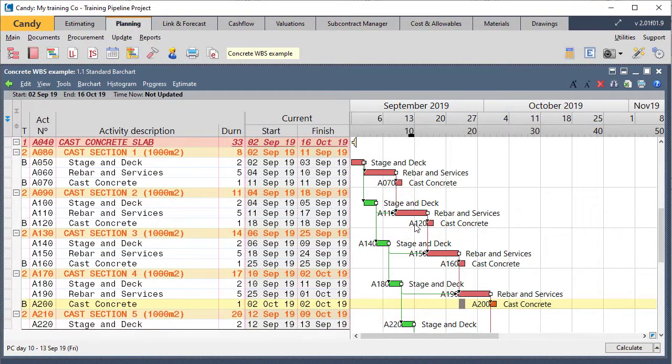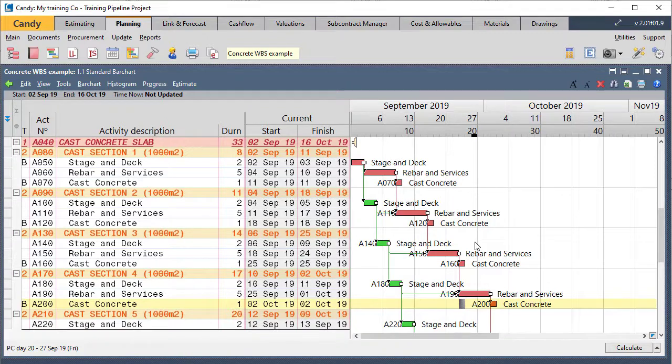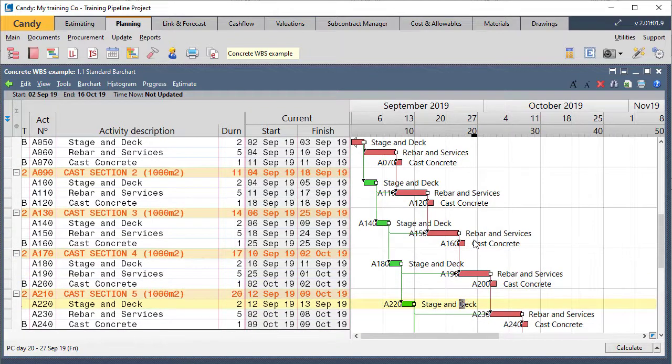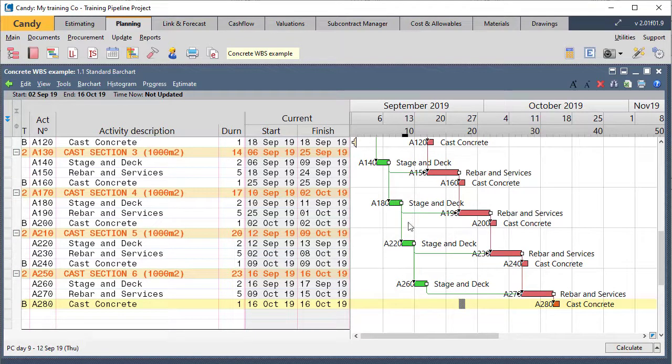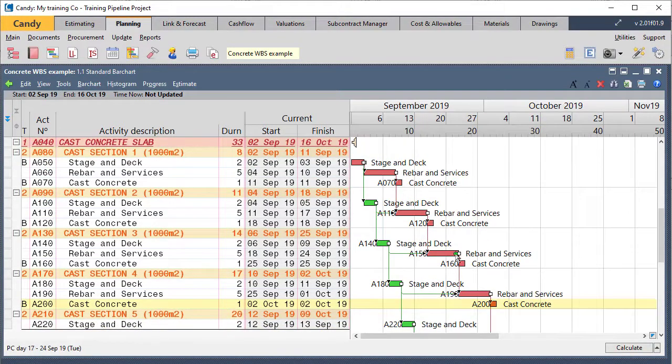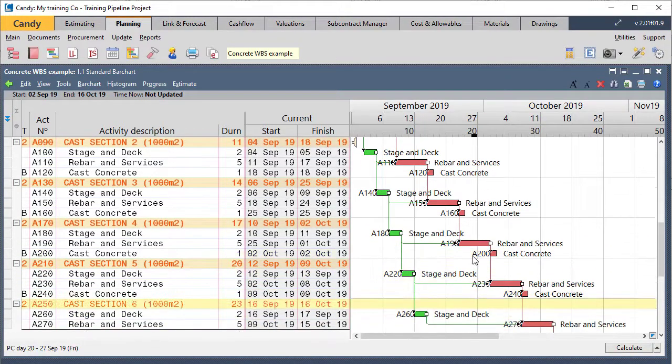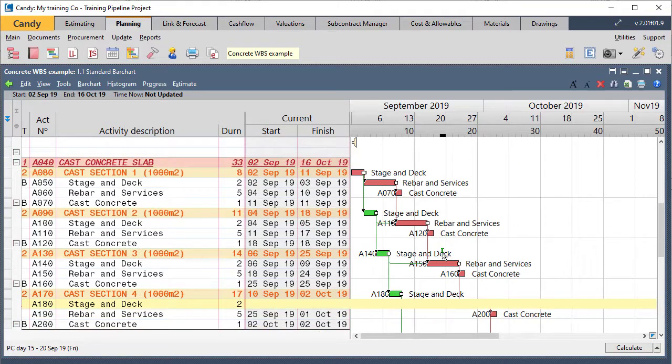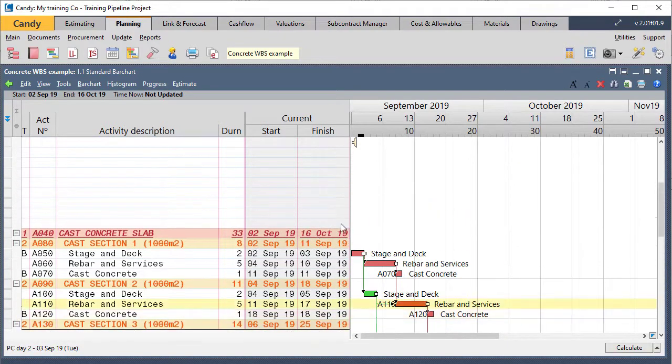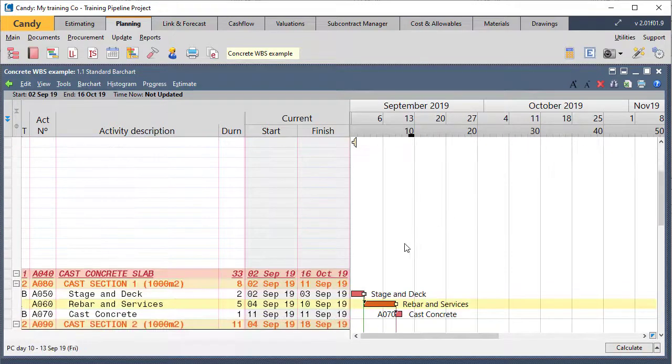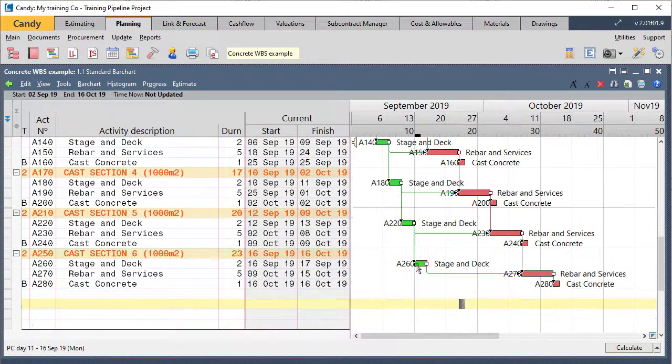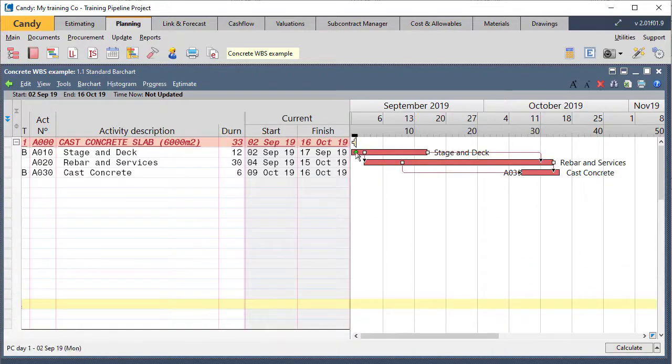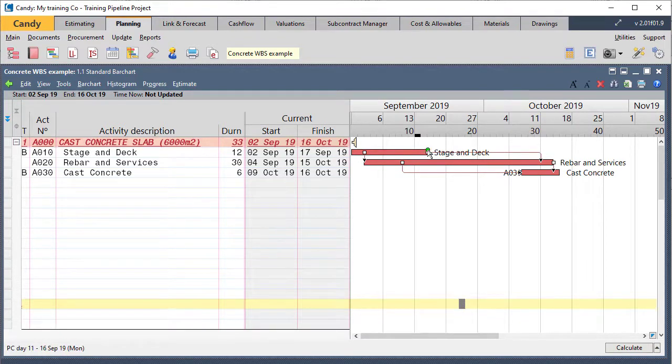Because at this point, if something should happen on the casting of that section two, we can quickly isolate it and see the impact, rearrange our schedule, revise the baseline, whatever we need to do. So this level of detail makes more sense. It's got a lot of finish to start links, which is simpler to manage and cleaner. I've got finish to start links on all my tasks right up to the end. And if you look at the end dates here, that 2 September 16 October, it's exactly the same as my bulk item over there. If you look at staging and decking in isolation here, you'll see it forms the same kind of path and spans across the same calendar length as my low level of detail here at the top.